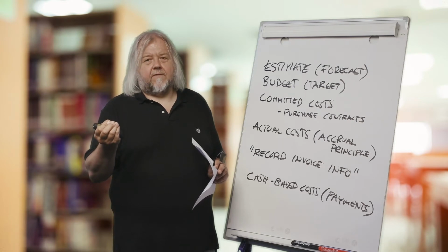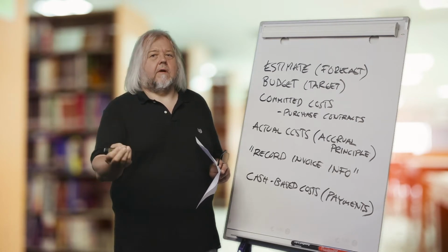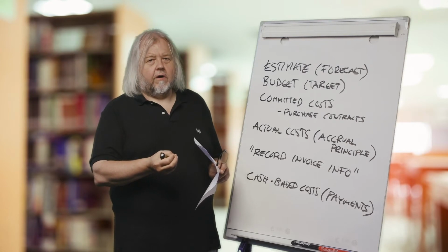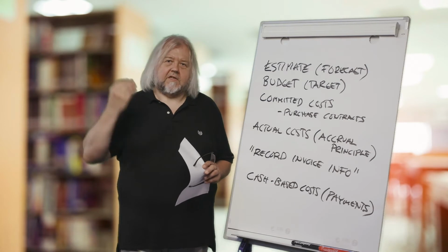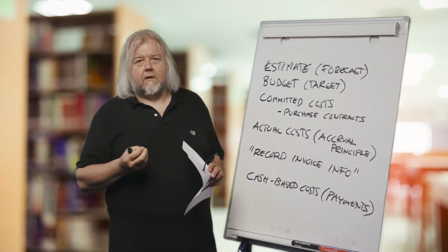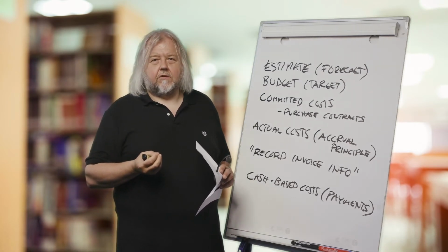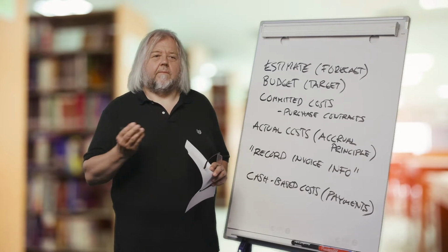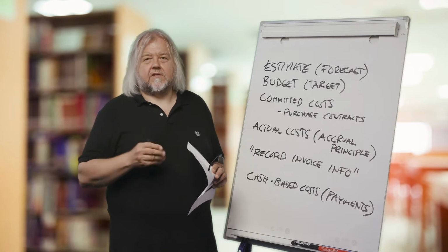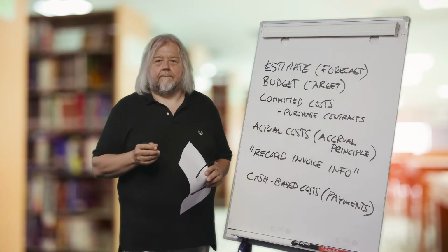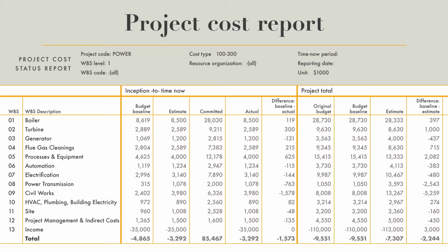And a good practice, of course, is always to compare to the original estimate, or if there have been some changes in budget which have been accepted by the board or someone who is really legitimate to do the changes, so we can compare to the updated budget, which now in this reporting is in the column of budget baseline.